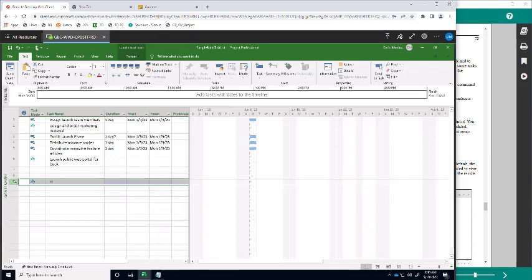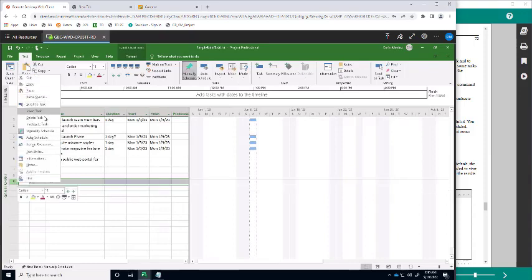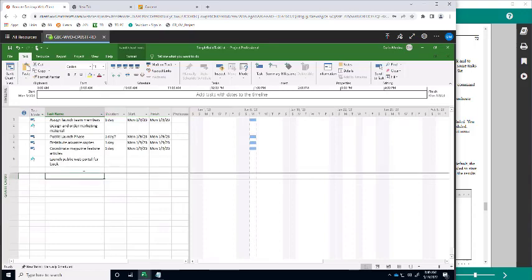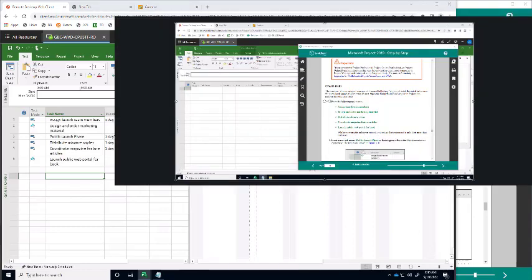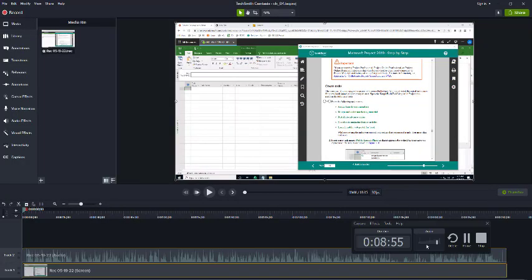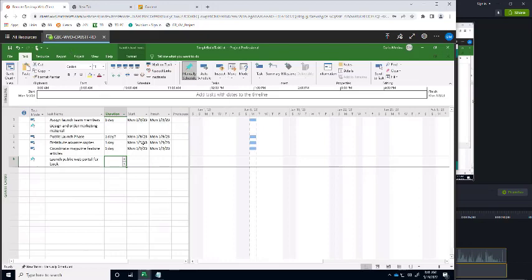Okay, I'll just delete this and delete task, and I'll change the mode. Just give me a second here. Okay, now what I want to do is that for every new task that I do create, I want the default for the task mode to be auto scheduled. To do that, you go to task, and then instead of the manual schedule being the default, I'll change it to auto schedule. Just click here, and the default is now auto schedule.